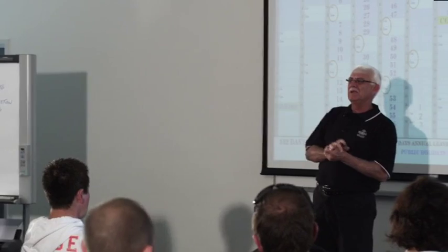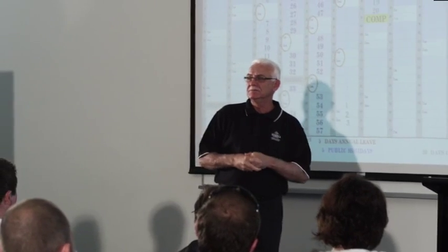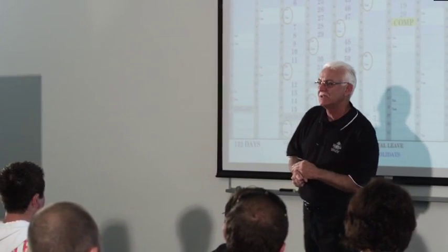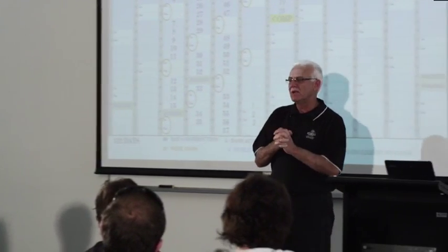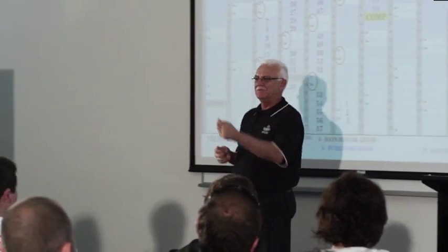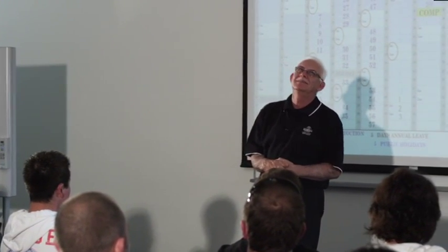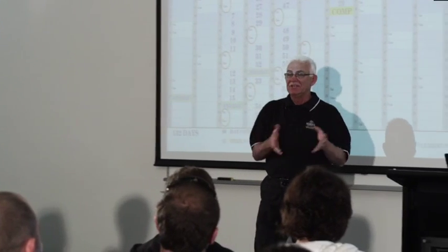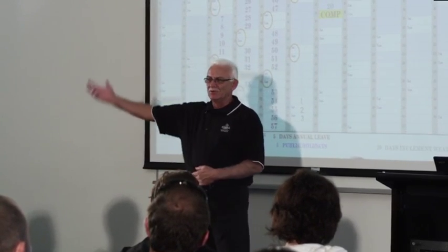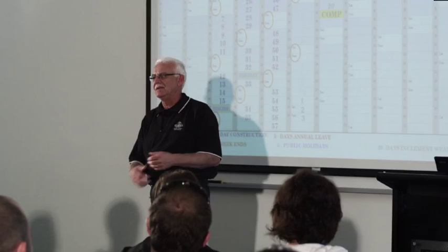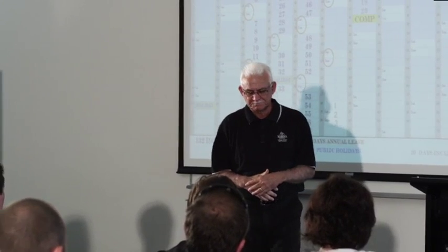Many builders currently put in $1 in their liquidated damages. They get into trouble, haven't put in a time extension claim, gone over time, owners ask for their claim as liquidated damages, and they give them $50 because it's gone over by 50 days. Yeah, $50 a day, $50. You're kidding me. All of a sudden that just generates one hell of a dispute because, as John said, they've organised their removalists, they've organised furniture, they've organised this, they've organised that, and you're going to give them $50 for compensation? I don't think so. You're going to end up in the tribunal.